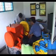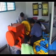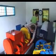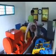The upgraded scheme went into operation on the 24th of December 2000 and was officially commissioned in the following January, when representatives from GTZ MHPP and the contractor conducted extensive testing of the equipment.